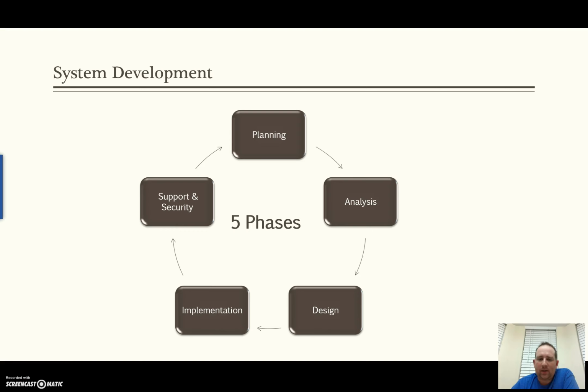Document the entire process. Every decision that's made, document every decision so that you know in the future, and so that everybody else knows exactly what's going on throughout the project. Some issues that you can run into if you don't document every step of the way is what happens whenever somebody leaves. If it's not documented, they leave with that data in their head, and then you have to start all over. And then data and information gathering. That's just making sure that everybody has the most up-to-date information throughout the scope of the project.